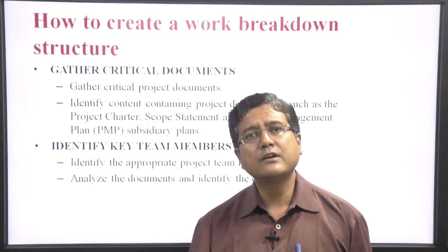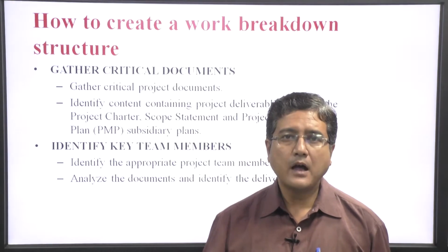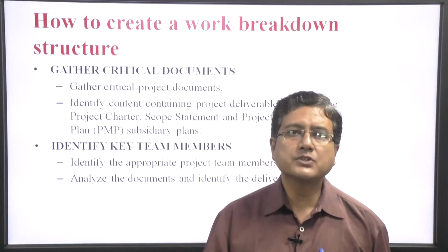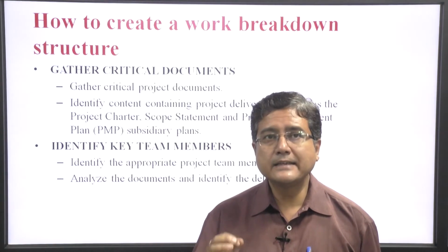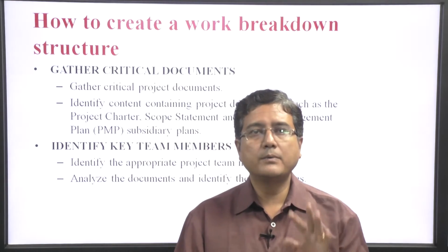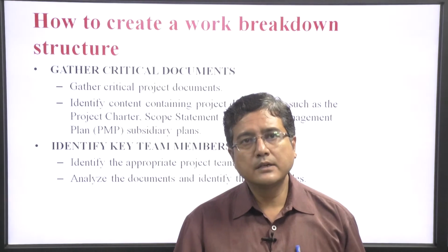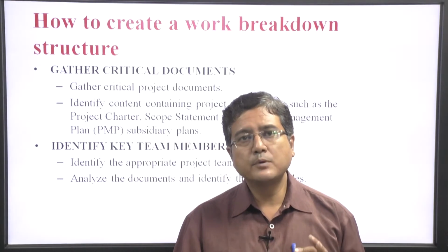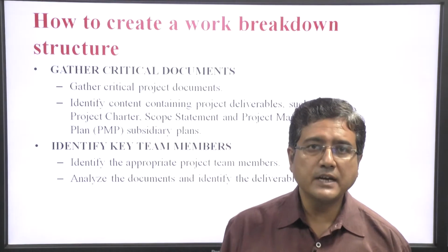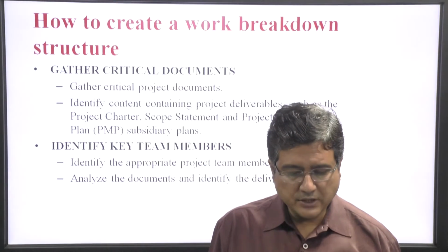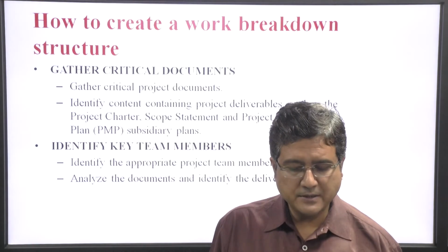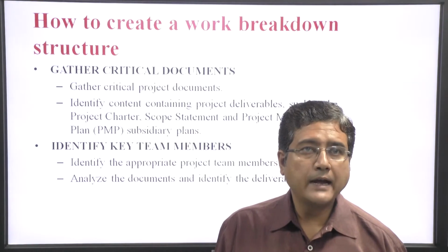We can create it by first gathering critical documents. Critical documents include the detailed project report, all the things related to the project, deliverables such as charter, scope statement, project management plan, and subsidiary plan.